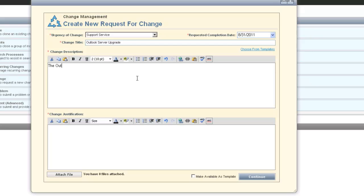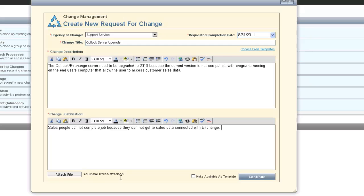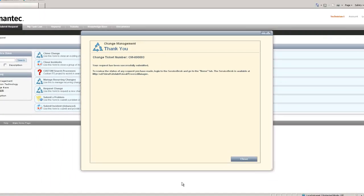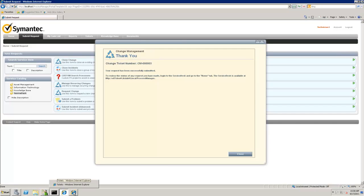We will add the information, description, and justification about the change so that when it gets submitted to the change authorization individuals in the CAB, they can understand what the change request is for and the business justification for it. After we're done with this, we'll click the Continue button to go to the next step. This submits the change and gives us a confirmation page to review the request. We can then submit the full request to the change manager for approval, and we get a confirmation with that change ticket number.